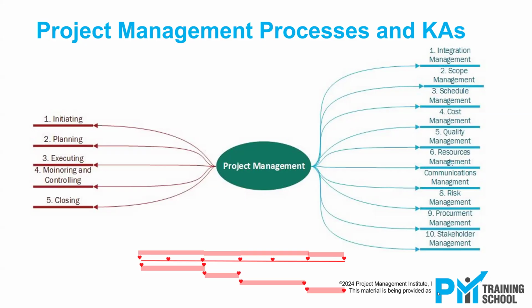We don't necessarily need the entire project team for that, because this timeline is not an exact calculation of the time. It's an approximate, very high-level calculation. But when we develop a detailed Gantt chart, then we exactly know the start and finish date of every activity, not just the phases, every activity. So far we have not gone there.